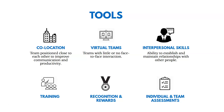Next, we're going to be developing the team. In this process, we're training, coaching, and getting team members ready — building their capabilities so they can perform their work without issue. Key tools include co-location, which positions the team close together to improve communication and productivity; virtual teams; interpersonal skills to manage relationships and help the team work together; training for team members less familiar with the industry or field; and recognition, rewards, and individual team assessments.